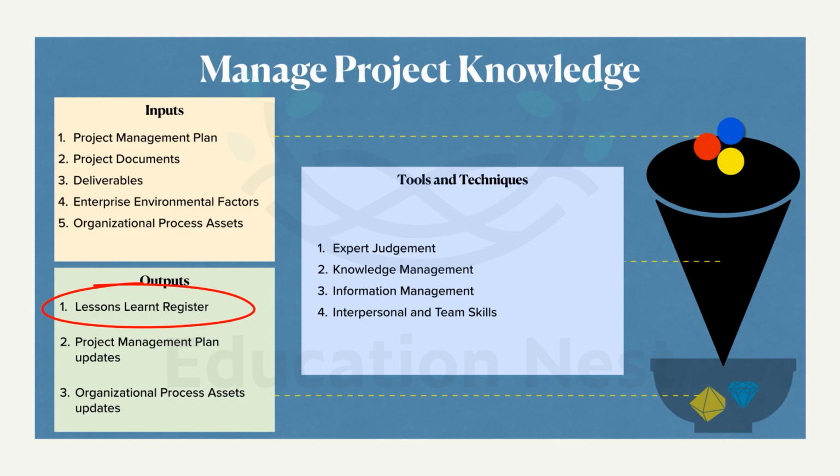When I say common, it's like everybody is contributing to this data. They enter the lessons learned in one single document, everybody from different teams. Or every team will have its own lessons learned, and then it is integrated finally by the project manager. This is a document which is usually reviewed also at phase gates, right? So this could be an important point for your exam. Where is it reviewed? It is reviewed at a phase gate.